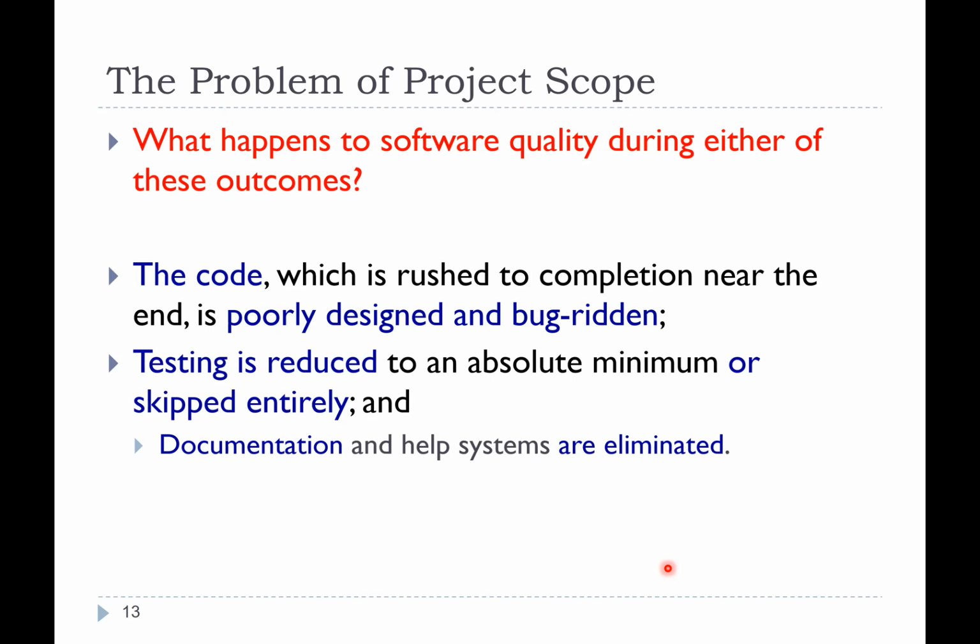Do you know, in research, they actually say that a proper software engineering process should have 50% of the project's budget dedicated to testing. We spend less than 5%, but properly it should have been roughly 50%.